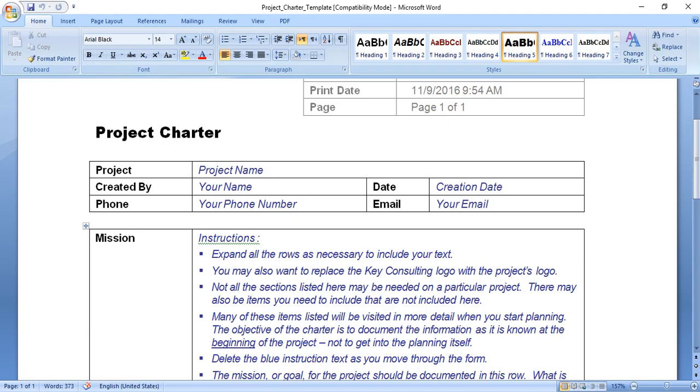When departments submit more than one charter for consideration for a given fiscal year, assign a rank order to each project, and code the most important as 1, then 2, 3, 4, and so on. This will help the project selection team to know which are most important to your department.